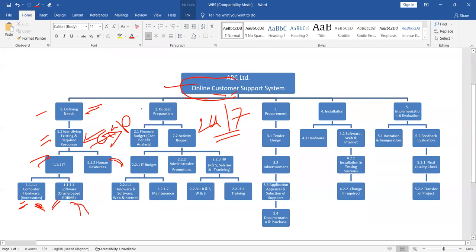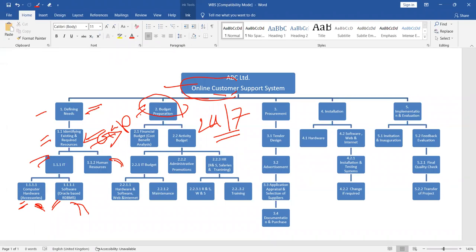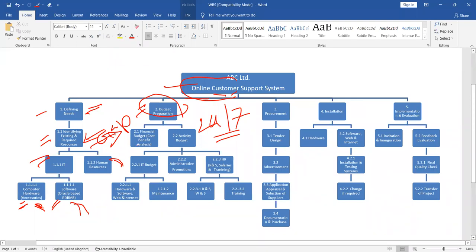Number two, the broad category is budget preparation. That is task one. But you can't be a successful project manager if you can't break this budget preparation into several tasks. You need a financial budget. You need activity budget. Under activity budget, again, we are dividing. You need IT budget. You need administrative and promotions budget.